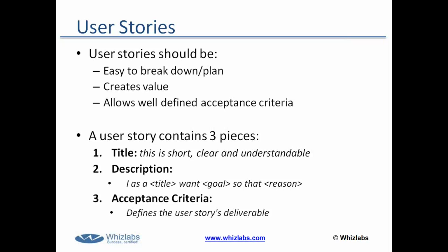And that's why the developers need to focus on getting clarification from the user stories in terms of what they'll need to develop. This clarification is critical for the developers to go away and start developing products, right? So a user story contains 3 pieces of information. First, the title, then a description, and then an acceptance criteria.